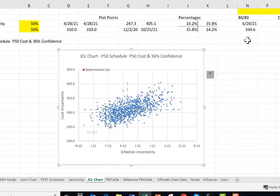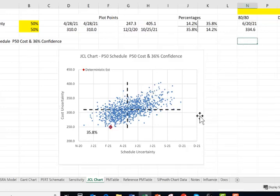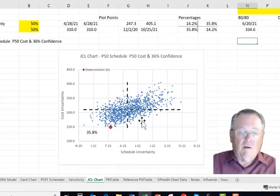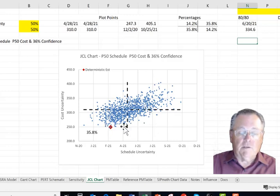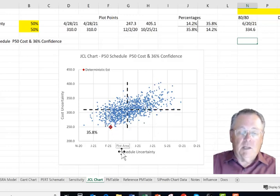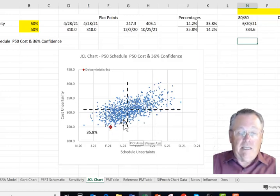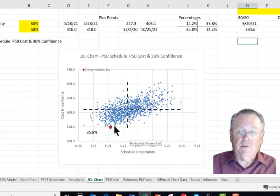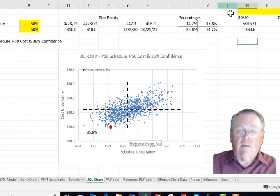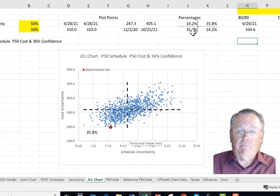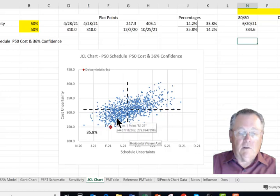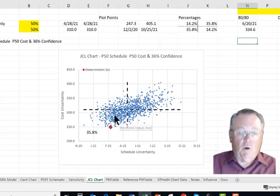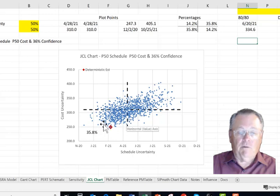So now what do we have here? We've now made a grid for four grids, and we can see that if we just count the dots in each of these grids, which is done over here, that 35.8% of the time we're down here in this lower quadrant, which is when we're below the P50 cost and below the P50 schedule.